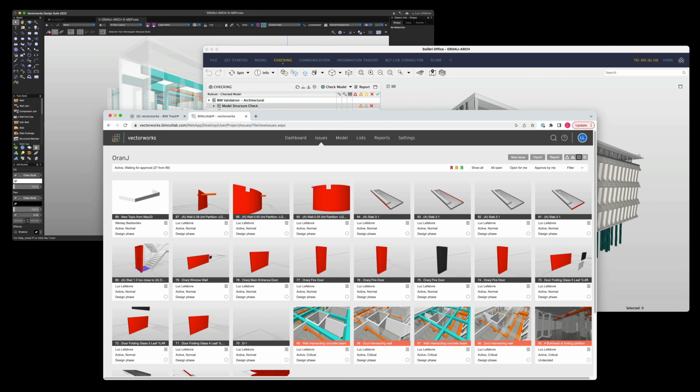A web service like BIM Collab or BIM Track, for example, is like a database where all issues are managed. Benefits in using these types of services are, one, a more transparent process. It's data-driven, so you can get reports out of it. You can set various types of permissions for viewing or editing, giving better control over changes required. And then lastly, it can be accessed by everyone involved in the project, including the client.